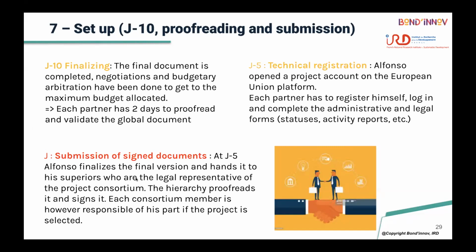I would suggest doing it maybe 1 month before or 2 weeks before. It already happened to us. We submitted a document to be signed by our authority. But when we submitted the document that week, the authority was not at the university. So we missed the deadline because he said that he was out of office and didn't have time to read all the documents in detail and submit them to the legal representative to check every engagement of the institutions.